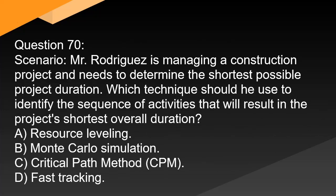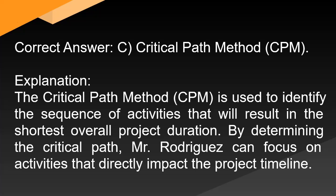Question 70: Mr. Rodriguez is managing a construction project and needs to determine the shortest possible project duration. Which technique should he use to identify the sequence of activities that will result in the project's shortest overall duration? A. Resource leveling. B. Monte Carlo simulation. C. Critical path method (CPM). D. Fast tracking. Correct answer: C. Critical path method (CPM). Explanation: The critical path method (CPM) is used to identify the sequence of activities that will result in the shortest overall project duration. By determining the critical path, Mr. Rodriguez can focus on activities that directly impact the project timeline.